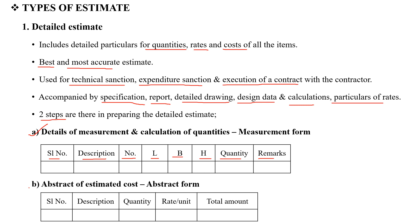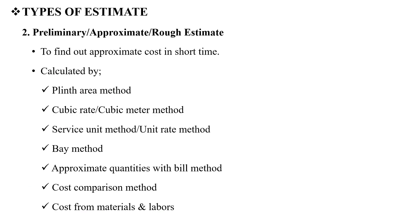The next step is the abstract of estimated cost. This includes the abstract formula, tabular column, descriptions, quantity, unit, and total amount.